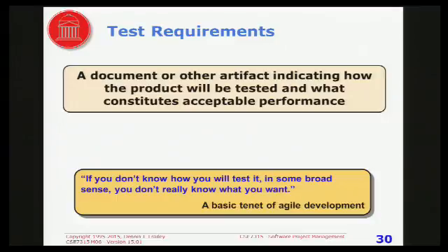And the important thing to keep in mind there is that if you don't know how you're going to test it, you probably don't know enough to build it. If you build it and don't know how you're going to test it, what most likely will happen is you will think it's fine and the customer won't. What you want to do is to make sure that you and the customer agree on what tests will be run to make sure it works.